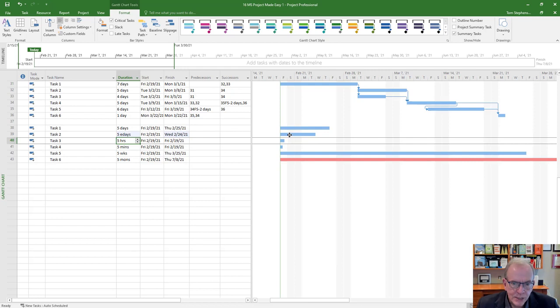That shortens that, but what it's doing, it's counting the weekend, elapsed days. So in construction, as an example, if we had 7 days for concrete to cure, you'd probably want 7 days ED, because it's not like the concrete hits Friday night and says, oh, it's the weekend, I'm going to stop curing and then I'll start. No, you want it to count those days right through the weekend. So that's a quick shortcut.